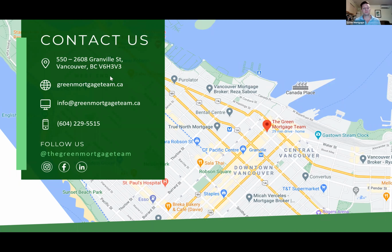Yeah, Jazz. So in that spreadsheet, the cost required to get to the next draw was the total amount of capital that you've put into the project already, plus the amount of cash you need to get your next draw, which means if you already put in $200,000 into the project and you need to finish 40% of that project, it was an extra 160 grand. Now you've got 360 into your project. So your capital amount that you've put into the project is up to 360, and then you get a draw, and then, okay, now you've received 144 grand, and now I'm down to here, and then I'm going to, again, have to put more money into it, and then I get another draw. And so your peak capital will vary depending on what that looks like. And so, yes, the spreadsheet was designed in a way to easily show you what your peak capital requirements are, or the capital requirements throughout the project, so you can understand that.